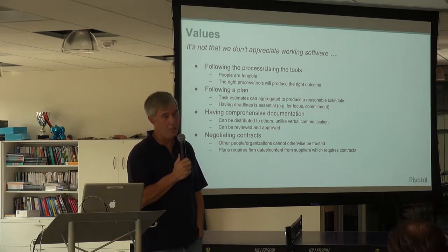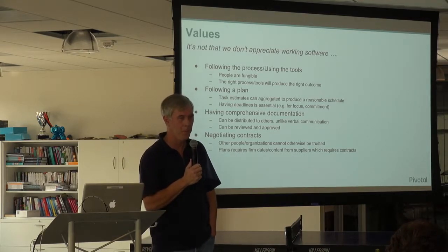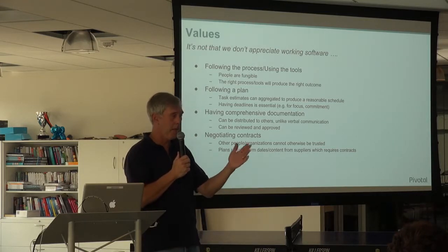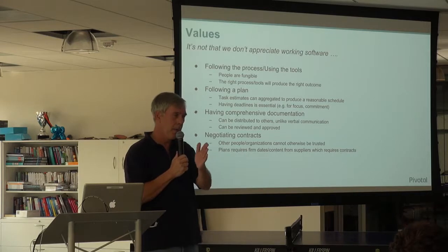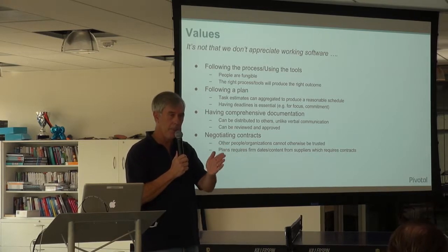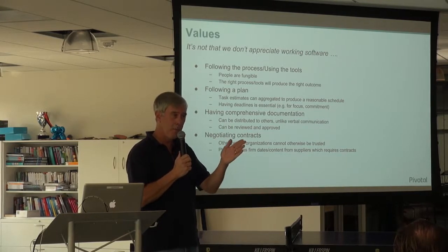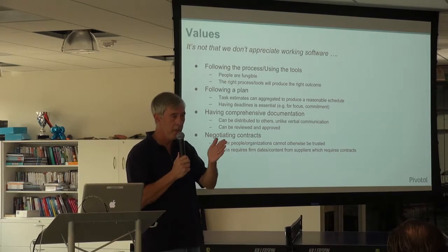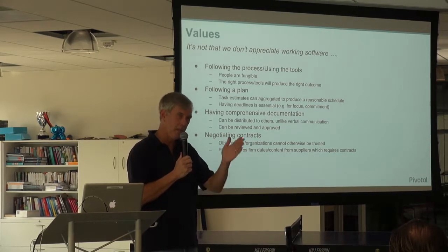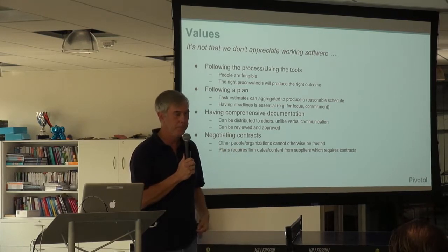Well, and you won't slack off, that's the sense I had too, right? You want people really to be motivated. The way to motivate them is give them some deadline. And there's also this phenomenon. I don't know if this is true with Waterfall or not, but there's certainly a case where I know this project's going to slip, so I'll take their estimates, I'll cut them in half, and I will hold them to that unrealistic date with the thinking that I'll get it sooner than if I plan towards a realistic date. So we'll just hold them to that until it's obvious it can't be made, and I'll slip it a little bit and repeat.